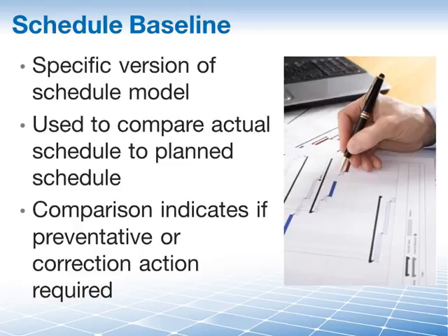Are you already seeing some kind of a trend here in regards to the baseline descriptions? Final note on this one. The schedule baseline, by the way, will also tell you when costs will be incurred, because it tells you when and in which order schedule activities are going to occur.